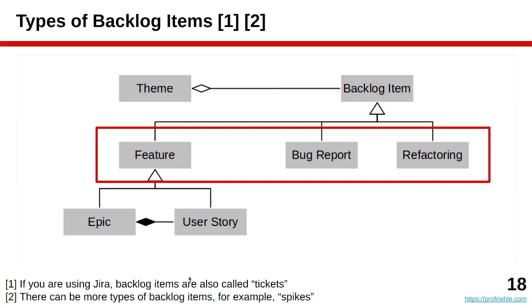Of the feature, meaning the domain functionality that the industry partner, the customers want, you can distinguish them into the coarse-grain, large-scale epic, which covers a subset of the domain but is too broad, too big to get done within a sprint, and the constituent user stories, smaller features that fall into an epic that are sufficiently small so that they can get done. An epic is a large feature, arguably, and user stories describe small features that can be achieved within a sprint.